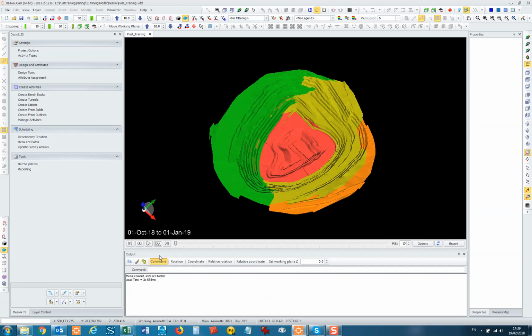stockpile and how much is coming off the stockpile, because it's a bit of a stupid system. It only does what you tell it to do. If you mine more ore than it requires, it will put it on the stockpile, right? So it won't then necessarily know to rehandle either the stockpile or take material from the pit. So what you have to do is, for example, limit the amount of material that can be put on the stockpile. So, for example, if you want to do low-grade stockpiling at the beginning, you might say, right, only allow it to feed material to the stockpile for the first 2 years. After that, don't feed any material to the stockpile.